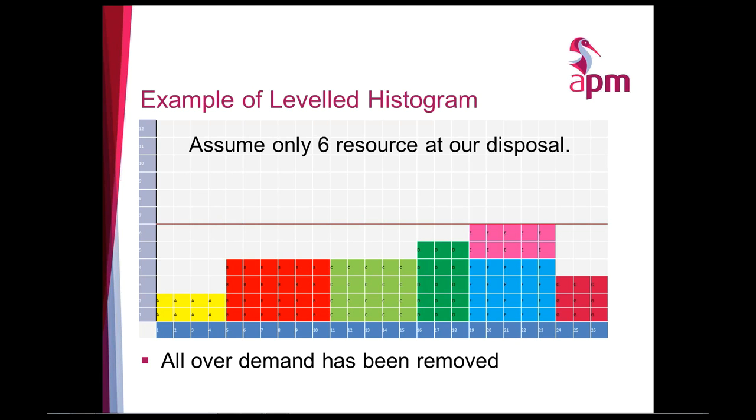It is. If you're using earned value, again, this is more on monitoring rather than scheduling, I think Primavera does earned value a little bit better than Microsoft Project. The reason I say that is, again, Microsoft Project is a little bit Americanized, and I don't think you can have SPIs of more than one and things like that.